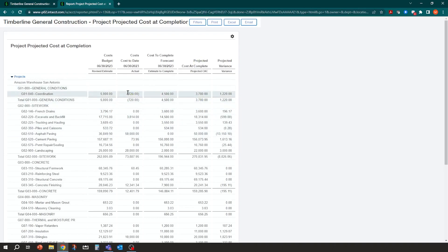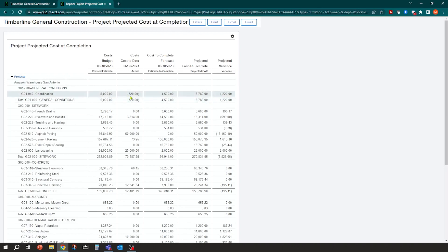So 5000 was my budget. I'm projecting to come in 1200 under budget. Some people like to show the negatives as under budget. So you could flip that formula depending on how you want to see it on the design.